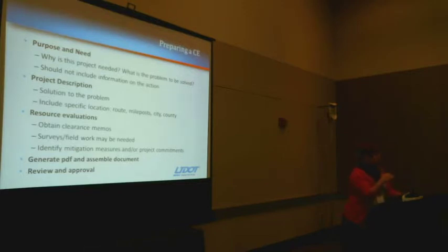And you can actually build that into your description as well. You can say, it's basically based on the information we have today, here's the proposed project. If that changes, it's going to need additional documentation. Or, there are wetlands adjacent to the project area. We've defined the project area as this. If that project boundary changes, that way you've identified it up front. So, I don't know if that answers your question.